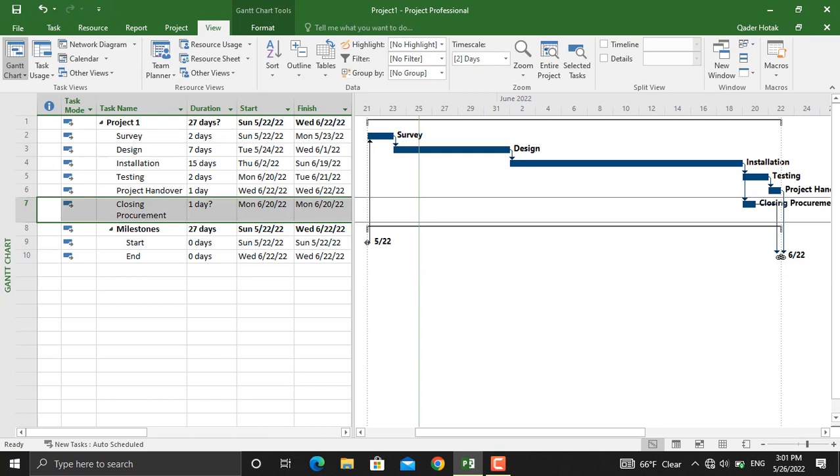Because as we mentioned in our previous videos, each of your activities in Microsoft Project and in project management in general should have at least one predecessor and one successor. If not, it will be called a hanger in project management and the tool you are using won't be able to calculate your critical path correctly.